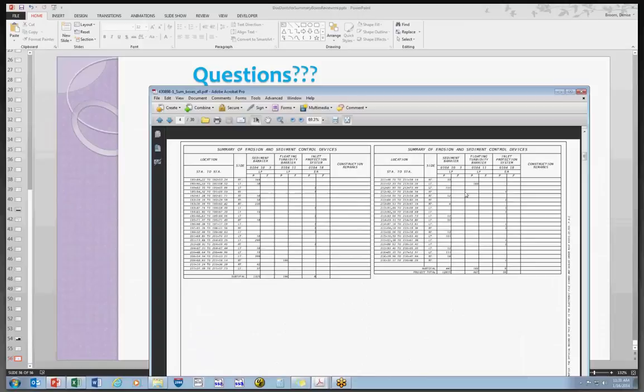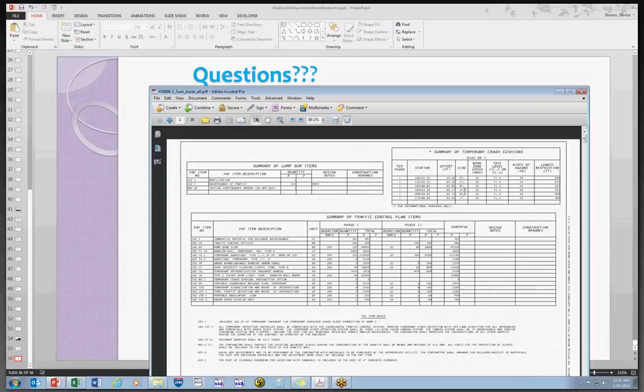Again, with the summary removal items, I would watch and make sure they're not including the curb or the sidewalk quantities anywhere that it's being replaced or relocated. I'm just going to go through here and highlight some of the things that I've seen. Again, the initial contingency amount is do not bid. It should not be in any of these summary boxes.